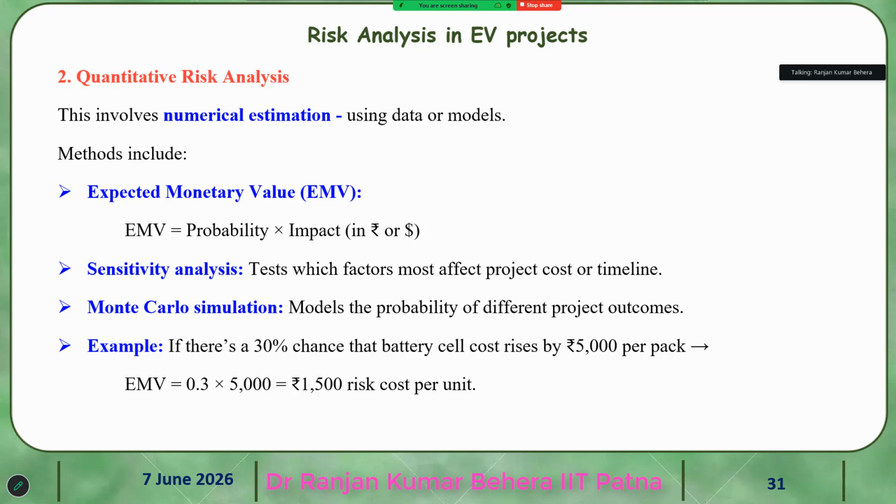Then quantitative risk analysis involves numerical estimation using data or models. What we want is the EMV, the expected monetary value, which is equal to probability times impact. The impact is in rupees.